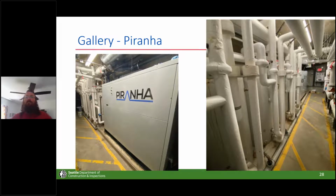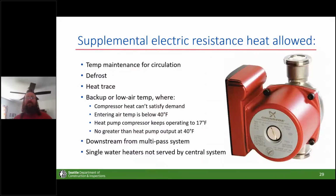And just to be clear, with any of these advanced technologies and new ideas, your friendly county public health department plumbing inspectors would love to have you come in and talk to them early and work out any issues and make sure everybody's comfortable with what's going on. Chris just mentioned that you'd want to locate one of these so that you didn't need to have a pumped sewage ejector to take you back up to a higher elevation. There's probably other issues like that. So they're interested in heading off problems before you're coming into the permit desk in a panic. Right. So, yes.